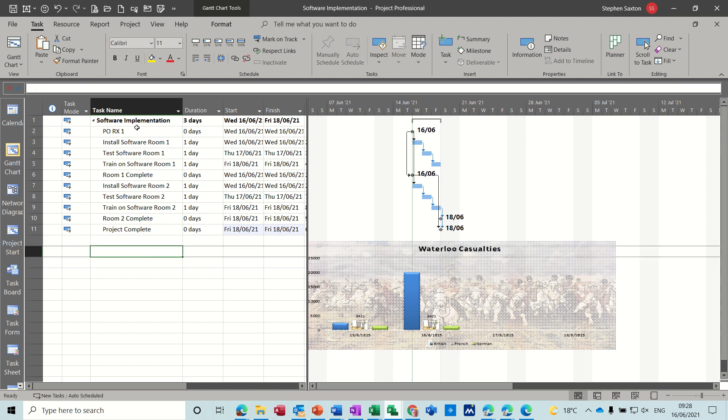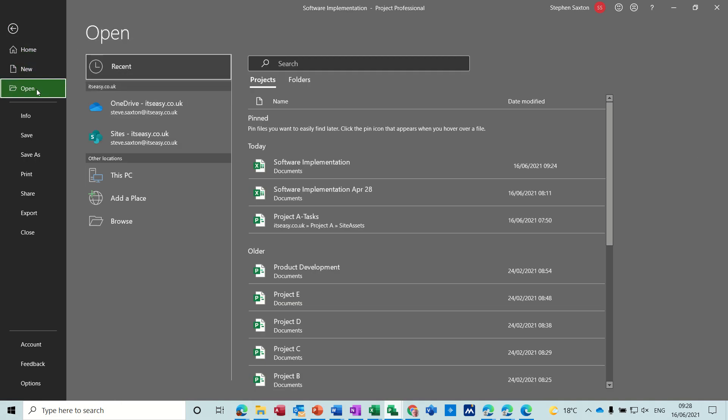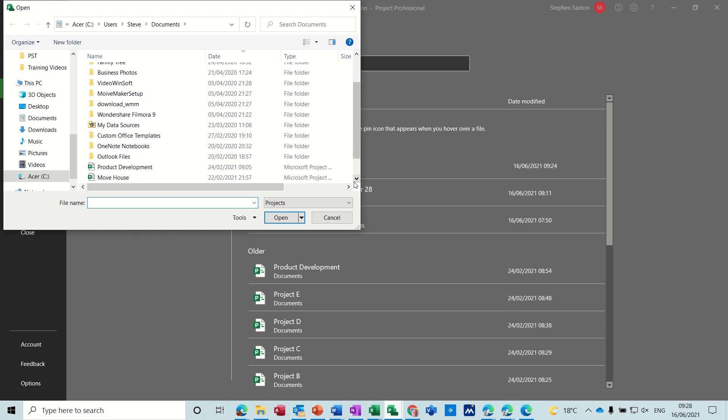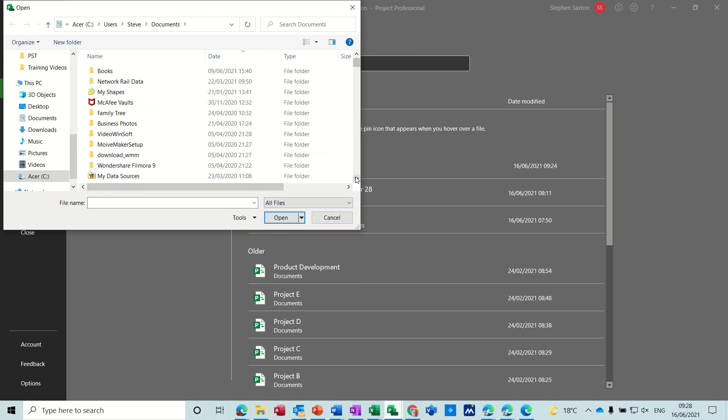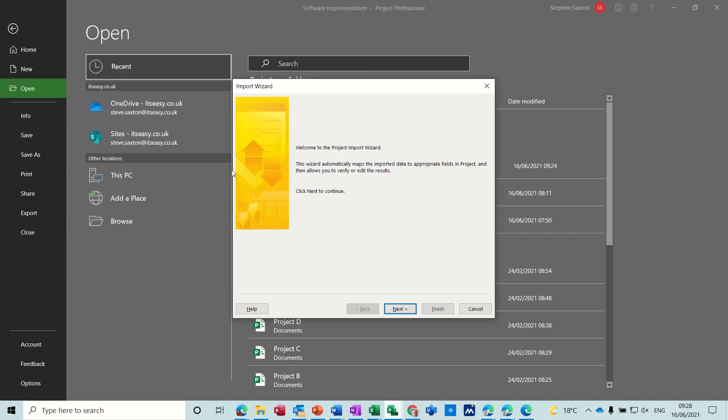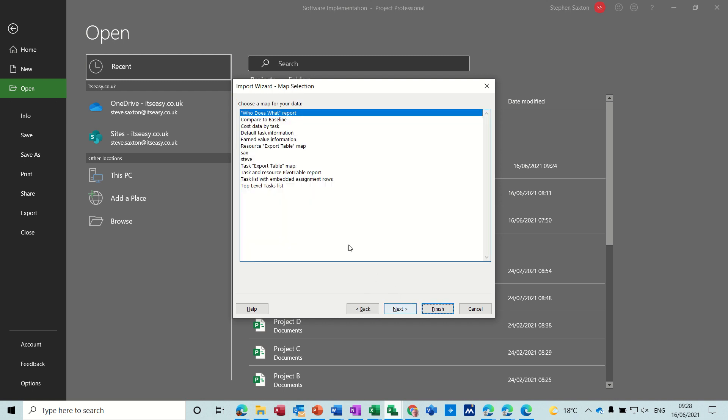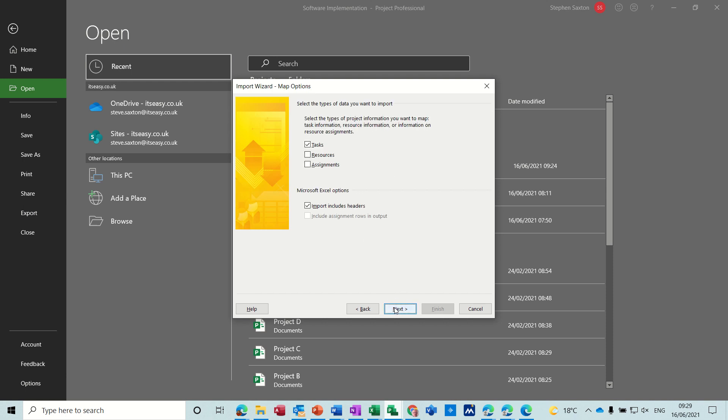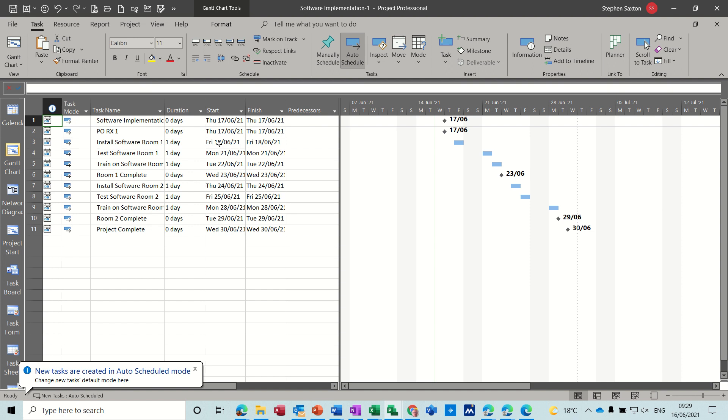Now because we have saved the map, if I go File, Open and browse and pick that up, I could have picked it up from the list there, I've just seen it. So it's an Excel file or all files, pick it up again. Now this time because we've used the map we can just go next, use existing map, next. And then you get the list of maps and you can see that there's some preset ones there already which is worth having a look at, just the different columns, different fields. Next, as a new project, next. The tasks are ticked because that's what the map said and there you go. And then you can just go finish and it drops it into a new project and you're ready to go again with that information because you've got those fields mapped.